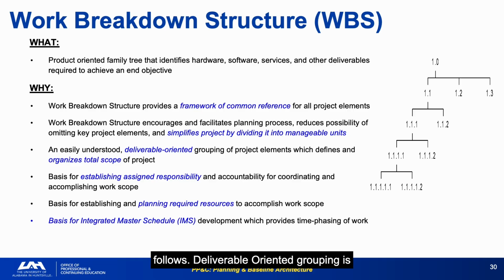Deliverable-oriented grouping is the design principle. WBS elements should represent things the project produces, not activities the project performs. When you see activity-based WBSs, you see control accounts that are hard to status objectively. The WBS is also the basis for IMS development, meaning that a poorly structured WBS produces a poorly integrated schedule, which in turn produces a poorly supported JCL, which results in a gate failure of PDR.